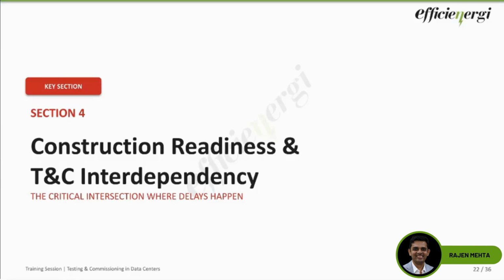Just say yes in the chat box. Or documentation was missing or incomplete. Or issues were pushed from construction to commissioning. So these are the problems that we are going to address. I hope there are some yeses in the chat, where people have faced issues that construction is not ready, yet told to do TNC. QA/QC is not fully done, cleanliness is not there, safety is not there, as-built documentation is not there, and so on. So these are the problems that we are going to address today.